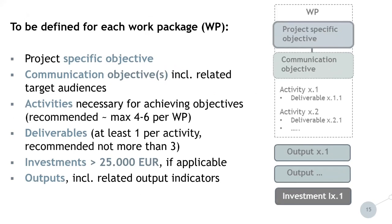At the level of each work package, it is necessary to define a project specific objective, the related communication objectives including related target audiences, and the activities necessary for achieving these objectives. We recommend a maximum of four to six activities per work package, though it can be more if needed by the complexity of the project. For deliverables, there should be at least one deliverable per activity, and we recommend no more than three deliverables in order not to be too fragmented. However, if necessary and justified by the long duration and complexity of the activity, it can be more than three.